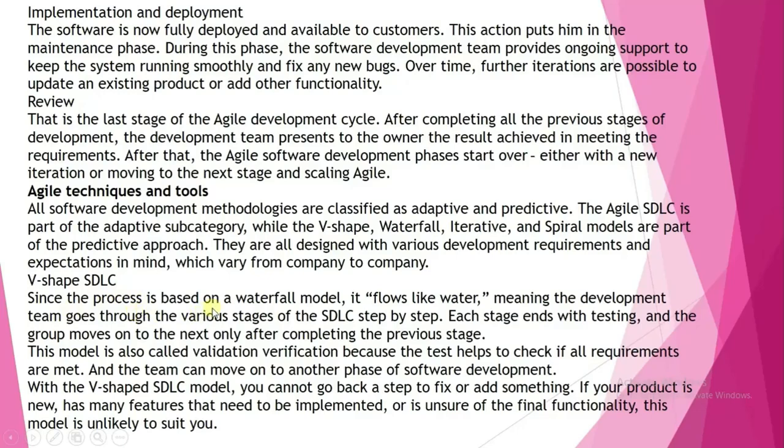Since the process is based on the waterfall model, it flows like water, meaning the development team goes through various stages of the SDLC step by step. Each stage ends with testing, and the group moves on to the next only after completing the previous stage. So here, without completing the previous stage, we can't move to the next stage. This is what happens in the waterfall method.